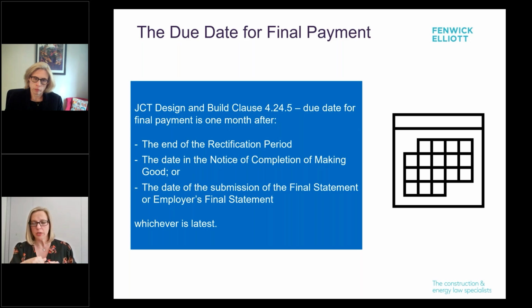Calculating the due date for final payment is incredibly important. This is because obviously it relates to when people will ultimately get paid, but also it's important for the purposes of issuing any pay less notices, and it also has an impact regarding the effect of the final statement or the final certificate, which I will come on to a little later.